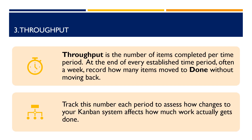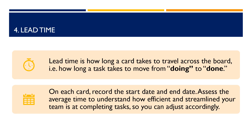Throughput is the number of items completed per time period. At the end of every established time period, often a week, record how many items moved to done without moving back. Track this number each period to assess how changes to your Kanban system affect how much work actually gets done. Lead time is how long a card takes to travel across the board — how long a task takes to move from doing to done. On each card, record the start date and end date, and assess the average time to understand how efficient and streamlined your team is at completing tasks so you can adjust accordingly.